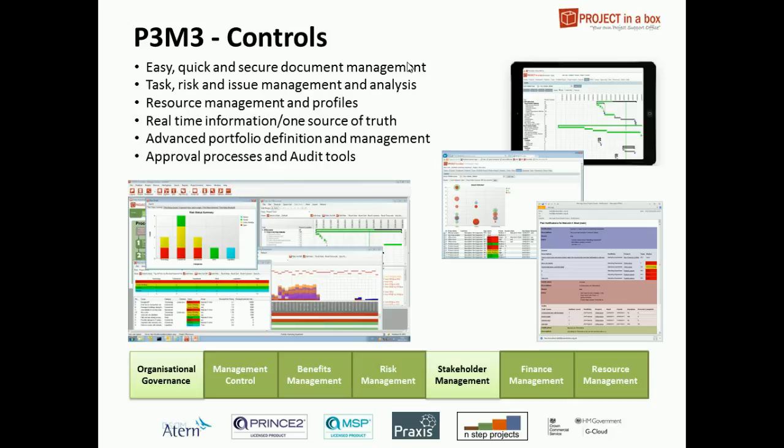When we've got these standard controls though, we read that data into our database. So when you update your plan, check it back in, the system reads out all the tasks from it and stores them in the database. It does that for every project, does the same with risks and issues as well. And that means we can give people like team members their list of tasks that they're working on the project, or they're working on across the whole system.